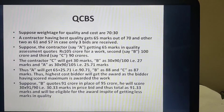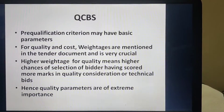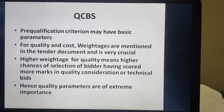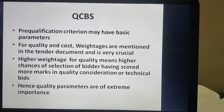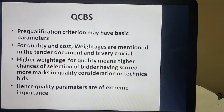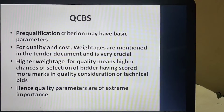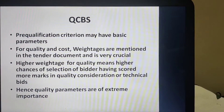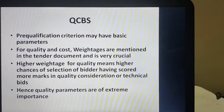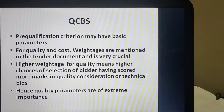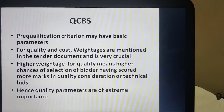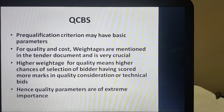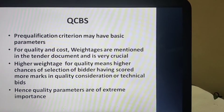Sometimes, in addition to this, we have pre-qualification criteria with basic parameters. Bids are first evaluated for pre-qualification and once pre-qualified bids are identified and deemed eligible, QCBS is applied. Weightages are very important — whether it is 80:20 or 60:40 for quality and cost will change the outcome significantly, so weightages are very crucial.